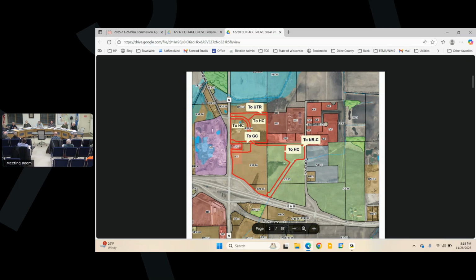I don't know about the 5 years though. There's a provision in state law that requires the developer to take care of it until 80% of the lots are sold. Yeah, so it kind of hinges on how quickly lots are sold, and at that point it gets inspected and then turned over.